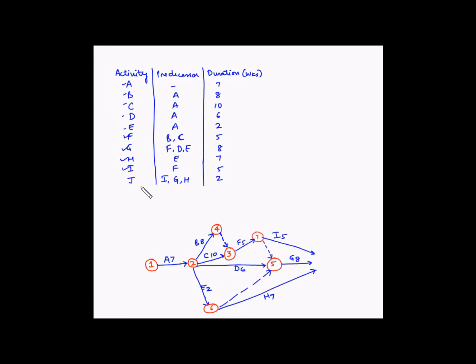The final activity is J, which is dependent on the completion of I, G, and H. We draw an ending node for I, G, and H and give it the number 8. From event 8 we draw activity J, which takes 2 weeks. Since J is the last activity of the project with no dependent activities, we draw the finish node and give it the number 9. This completes the network diagram for the project.